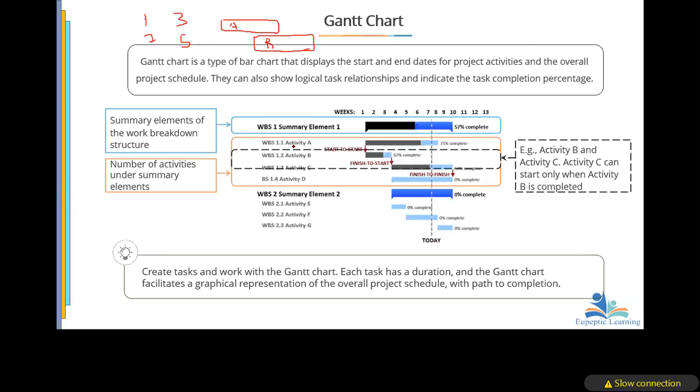Now, in fact, with the Gantt chart, the MS Project, it gives you the opportunity also to add the resources. Say this activity is going to be undertaken by, let's say, Michael. So you add Michael. It even has the component where Michael's rate per hour is also stated there, and it can calculate for you. So, MS Project.